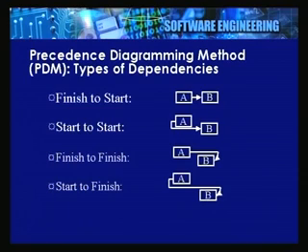So, we say counting installed network jacks is the activity that cannot be complete until the installation work is also finished. Okay. So, the activity counting installed jacks cannot start unless the activity install network jacks is complete. Okay. So, this type of course, please remember, in most of our day to day situations, we do not use many of these kinds of relationships, and of course, finish to start is the most commonly used kind of relationship.